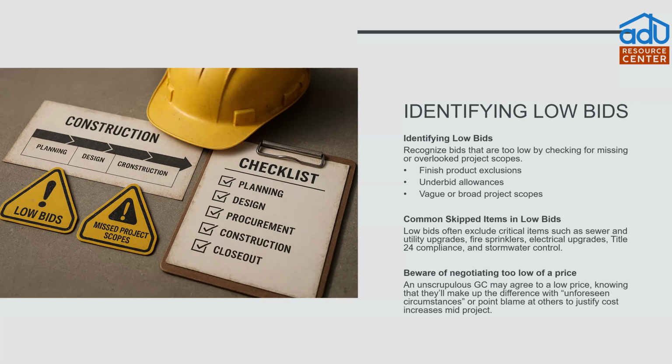And this is what'll promote change orders. So change orders are that unexpected surprise bump in the middle of a project when it's too late to say no because you've already begun. And so you feel obligated to say yes. And that's how they will recoup if they underbid it. You get one or two or three or four. And finally, when you say, I'm not doing this anymore, I'm not going to be paying for more, you said it was going to be this, that's when they sometimes abandon the project completely and disappear.